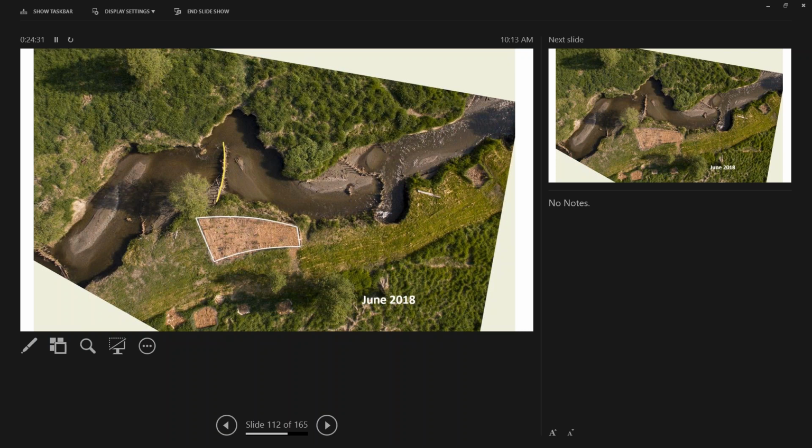I have another planting plot that was on the other side of a meander that's having a much more rough time in life. So, just in terms of planting plots and proximity to BDAs and siting your BDAs, it makes a lot of sense to put your planting plots on the inside of a meander. And that's just something that I didn't have in mind when we started. We were doing all of our planting on the right bank so that we could irrigate. And so I didn't consider left bank at that time because I wouldn't be able to irrigate.